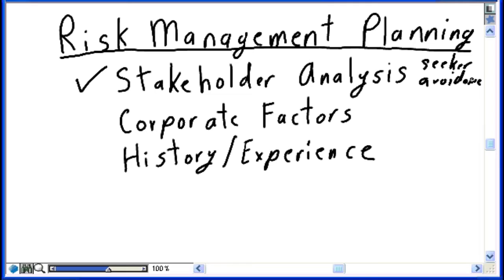If the project is initiated to develop a new product, or to develop a breakthrough approach, allowing the organization to deliver a new product or new service, to differentiate their product or service, that project should be a risk-seeking project. That project should be willing to take risks to develop that breakthrough strategy. At the end of the project, if the risks are too much and the project fails, it was a learning experience. The business still continues with the status quo, and they will simply start a new project with a new set of risks, with a new strategy to develop the next breakthrough strategy.